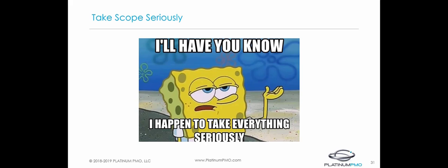One of the biggest reasons why scope creep negatively affects programs is because project managers take it lightly and ignore it. Spending the time up front to lay the groundwork and clearly defining scope will help you keep the project on track. When the client inevitably makes out-of-scope requests, don't be shy about telling them that you'll add their request to a phase 2 of the project, which will have its own scope and cost.